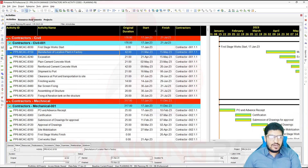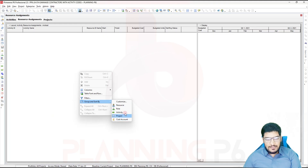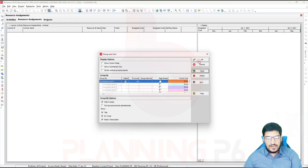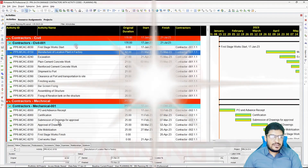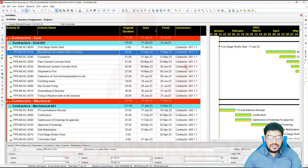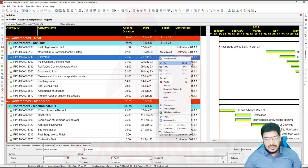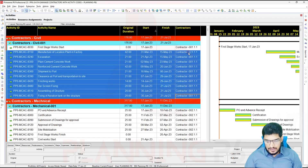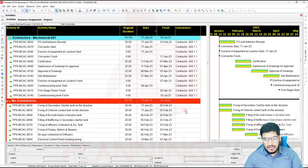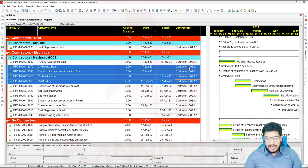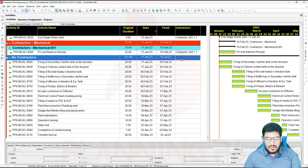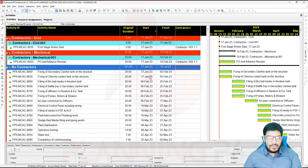If there is any resource assignment, with the similar way you can go to the Resource Assignment view, Group and Sort, and select here by customizing the same Contractors — it will show you the resources falling under each contractor. Secondly, how we can assign the activity codes using Excel. I will delete some of the activity codes here — delete for mechanical as well. For every activity code you have to assign; if you have two activity codes assigned to two activities, that is fine.